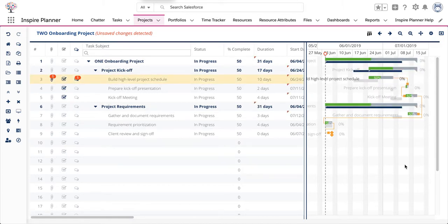So should a project task schedule change, you can visually see the variance between the planned schedule and the new schedule. By establishing a baseline and seeing the variance of your tasks against it, you're able to see which tasks take longer or whether they're often delayed.